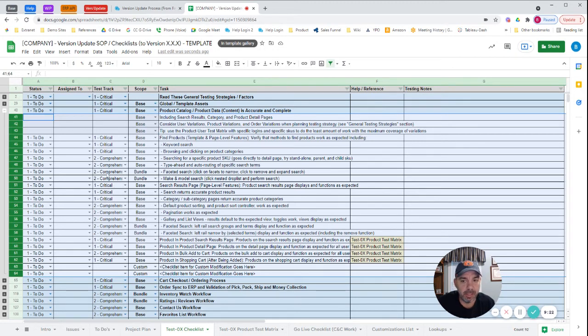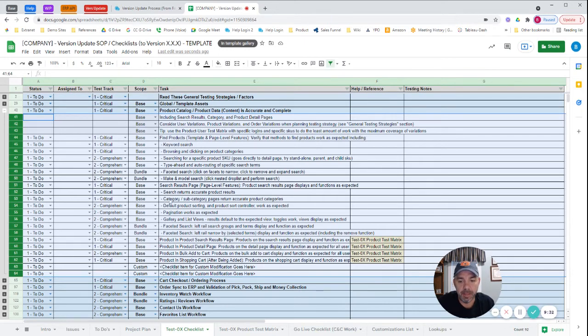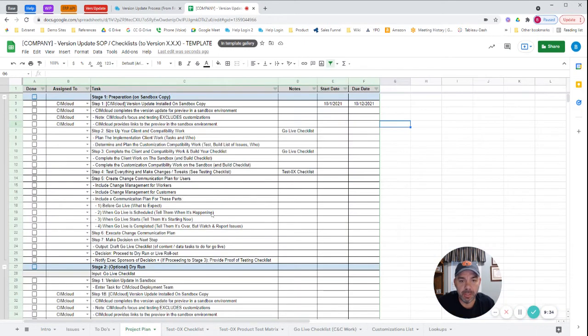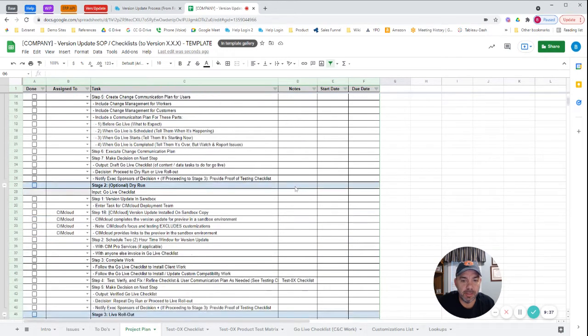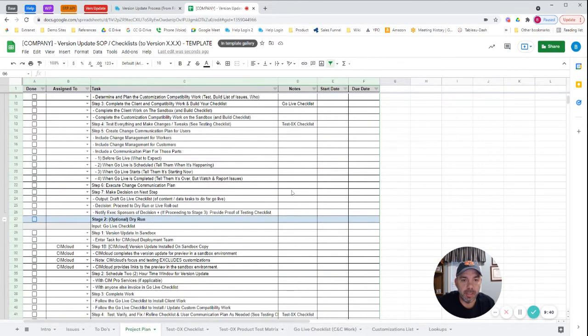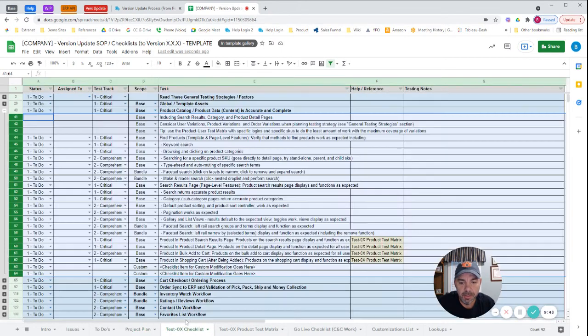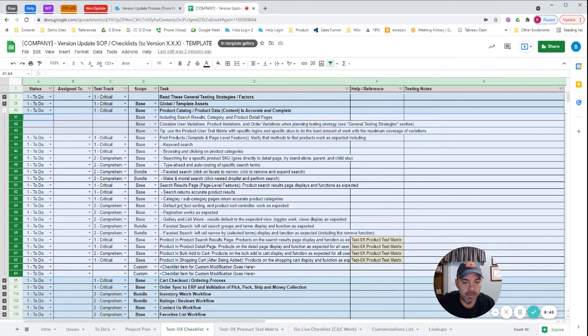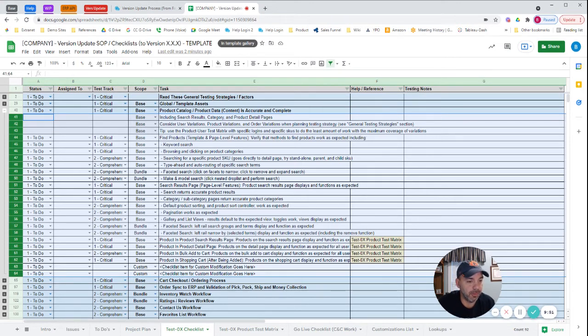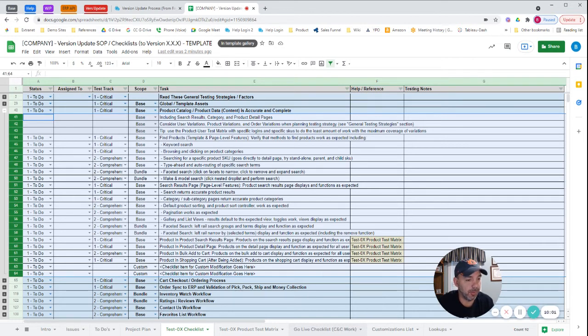Should we run the critical or comprehensive checklist? In either case, at the bare minimum, the critical checklist needs to be run at stage one, stage two to validate, and stage three after publish. And that's represented in the project plan. You'll see the test checklist represented there, and also the go-live checklist represented. So the test checklist is validating that the publish didn't break anything or finding stuff that it did break so it could be addressed. Any data changes are logged in the go-live checklist because you have to do them again when you publish because, of course, the sandbox has a separate database that's going to be thrown away.